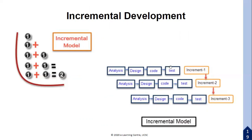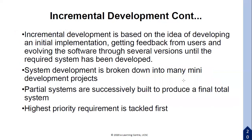In incremental development, you design, code, and test, then give the result to the user, developing step-by-step. It is based on the idea of developing an initial implementation, getting feedback from users, and evolving the software through several versions until the required system has been developed. The system development is broken into many mini development projects, with the highest priority requirements addressed first.